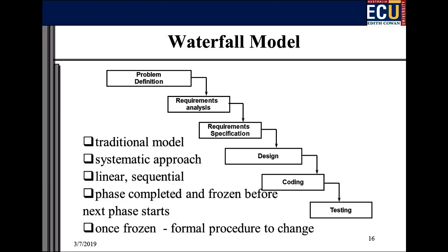Unfortunately, people got hold of that model and actually started using it. The actual phases are define the problem, requirements analysis, requirement specs, design, coding, and testing. And the paper basically concludes that just doing it this way, with the arrows going one way, it's never going to work. You should iterate, and it recommends iterating at least twice.